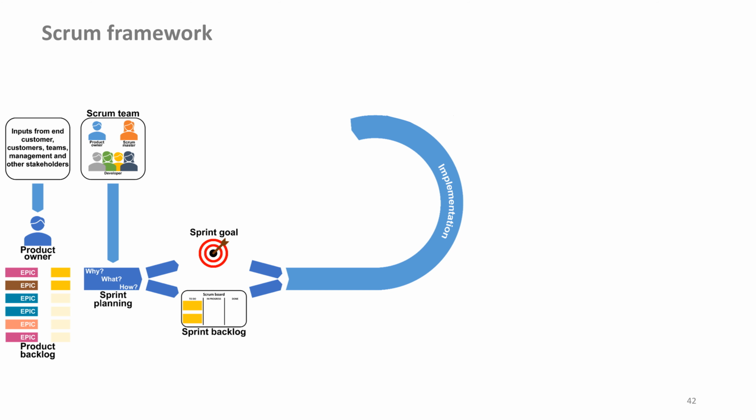But if we are now in a complex environment, hence the example with software development, for instance, we are doing new developments, new product functionalities, then we are probably in a complex environment. Scrum is worth it there. For a sprint duration, which should be less than 4 weeks, we make certain things as assumptions.